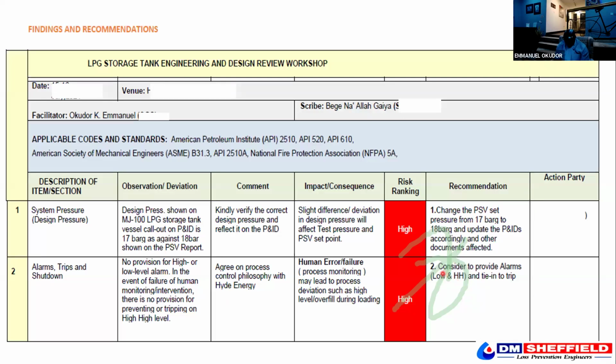Now, this is one of the cases where, in project management, you need to go back to the project sponsor, because to automate this is very expensive. The project sponsor and the asset owner also need to do a cost benefit analysis.